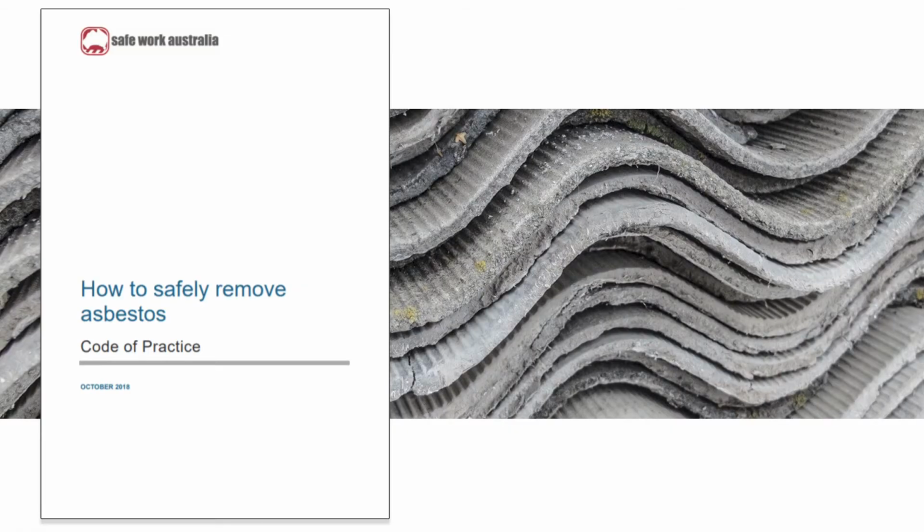This will involve the removal of possible asbestos sheeting, which will need to be confirmed, and if it is identified, removed according to the Safe Work Australia Code of Practice and disposed of accordingly. Any other asbestos or hazardous materials which could be disturbed by the removal of any other window or throughout the building works need to be identified as early as possible.